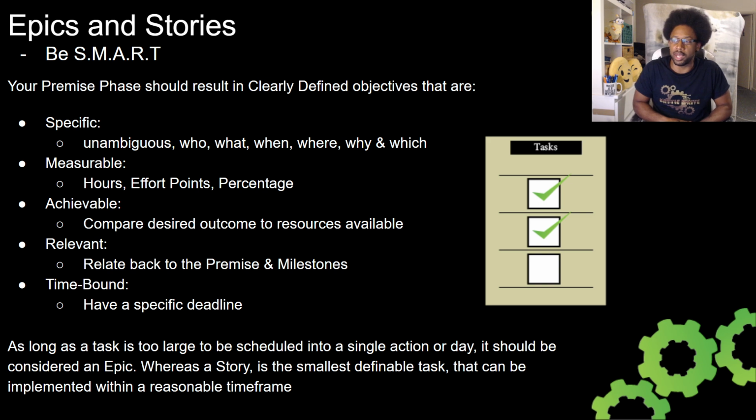It's also worth keeping in mind productive hours, something I'm going to talk about in my development stream. You generally want to try and break your task down into 2-hour windows. If a task will take longer than 2 hours, see if you can break it down. Because generally speaking, even though you can work up to around 5 to 6 hours without really losing too much momentum, you tend to take breaks at roughly 2-hour intervals. If you're working on something that is quite complicated, when you take a break, you're going to find it more difficult to come back to it, and it just slows down productivity. So try to complete tasks within that 2-hour window, and don't start a task that you know you're going to have to stop midway. Pick tasks that you know are smaller requirements.